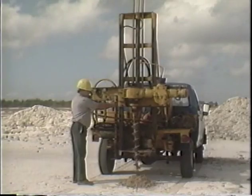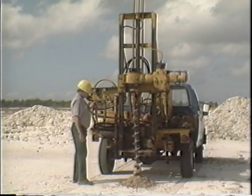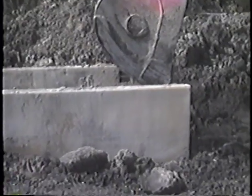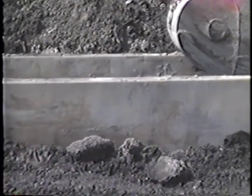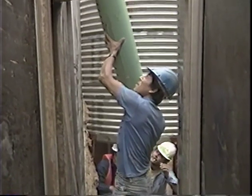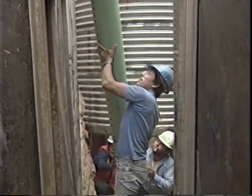After we've done a conditions analysis, or analyzed the actual site conditions, we've got to know what the soil is, if we've got good dirt or bad dirt. And when we're running a line for over a mile, we know that it's not going to be the same dirt all along the way. We know we're going to need a protective system since the soil here is questionable and all the rest is deeper than 5 feet. Well, along here where we've got a wide space without much to get in the way, we can slope out the sides of the trench, right?